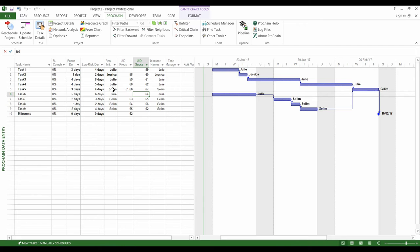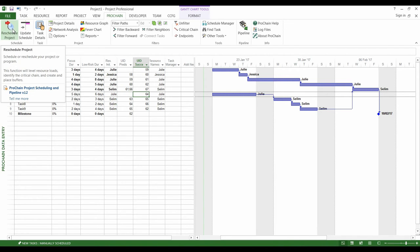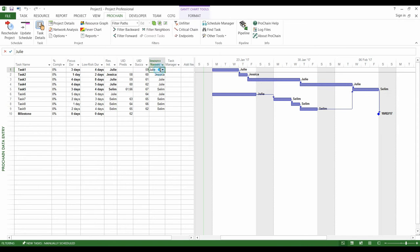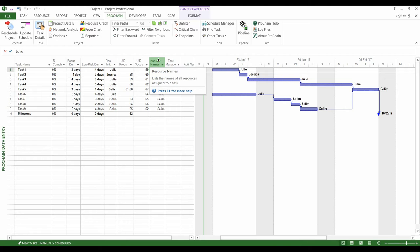Finally, it is crucial to specify which resources are in charge of the realization of the task, since Critical Chain is a finite capacity scheduling methodology.